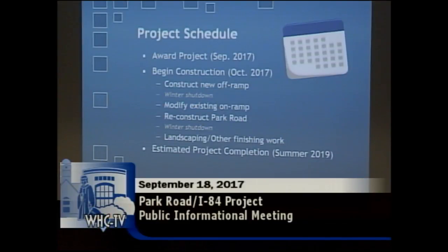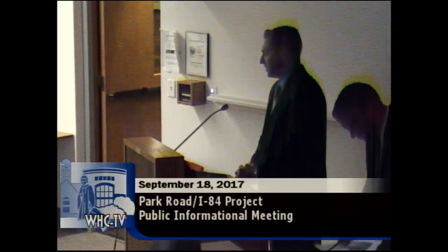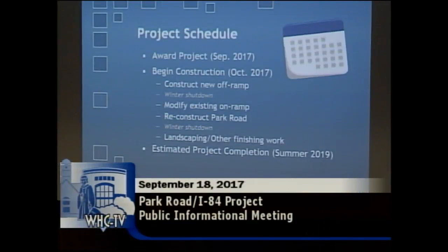Thanks, Dwayne. So I just want to briefly talk about project schedule. I know a lot of you are probably interested in that. Right now, the plan is to award the project. Tomorrow, actually, we have a pre-construction meeting. We'll be meeting with the low bidder on the project. It was Paramount Construction. They're out of Newington. We'll also be meeting with Weston and Sampson, who the town is contracted with to do construction inspection.